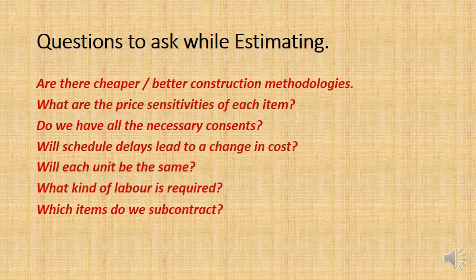What kind of labour is required? Don't just go for the cheapest labour if you need to have skilled labour. And also work out what items you will subcontract. As I said, some items you may want to subcontract. That will lower the risk. You would be giving risk to a subcontractor, but it would also be adding more cost.